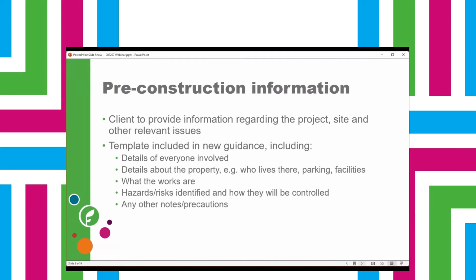Another element of the CDM regs is that you provide pre-construction information, and the client should provide that. So if you're an agency service, you're a client, you should provide pre-construction information. And as part of the details and the guidance on the website, we've included a template that you could use, which is proportionate to a shower or a stair lift, or that scale of adaptation, where you can provide that information and document it in an appropriate way.